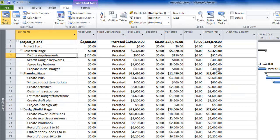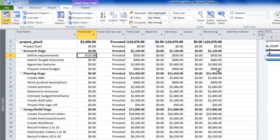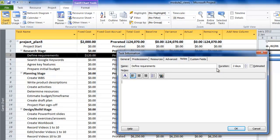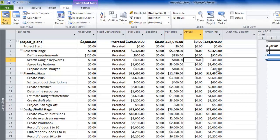Let's have a quick look at costs. You'll still have the task name to start with, no duration here, but what you have got is fixed cost - which is particularly useful when you want to apply a fixed cost to a task. Here for example on define requirements, $120 has been assigned. If you double click on the name of the task, it's often a good idea to go to the notes field and make some notes about the reasons for this particular fixed cost, as you can often forget about it once the project is underway. Other sections within the cost table: you've got the total cost of each task, and once you save a baseline this will be set. Once you're underway and tracking actual costs, you can compare that against the baseline and that'll give you the variance field.